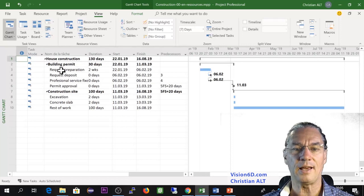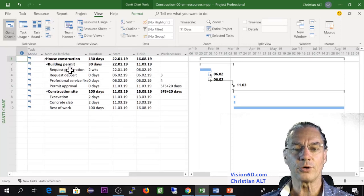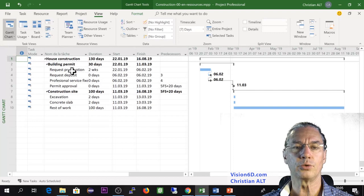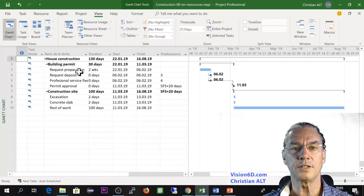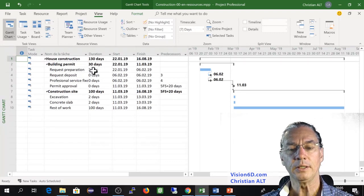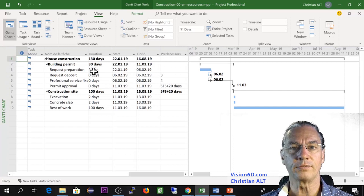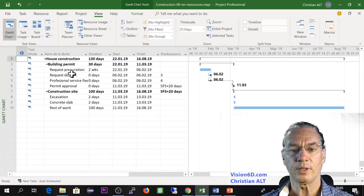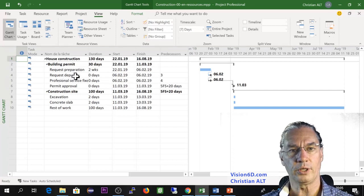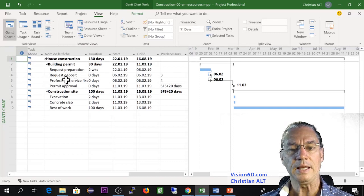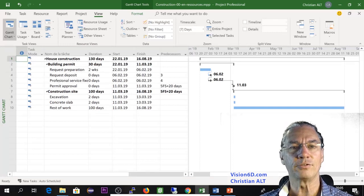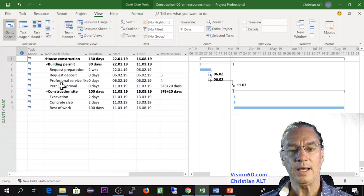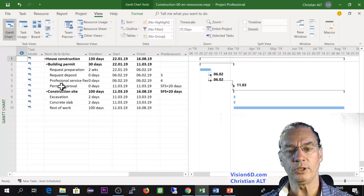So I will look into the building permit. You see that I have set here that first during two weeks we are going to prepare the request. That is to say more exactly it will be the architect office that will prepare this. They will also do the request deposit for me and after that I have to pay a flat rate and then I will get a permit approval.